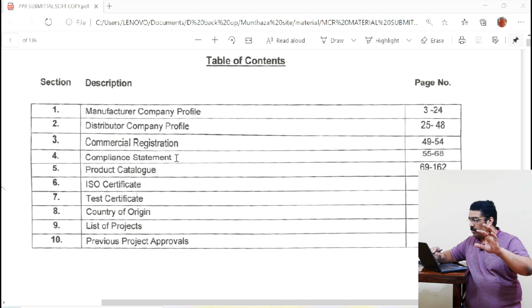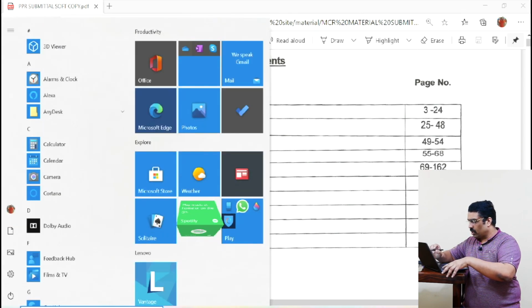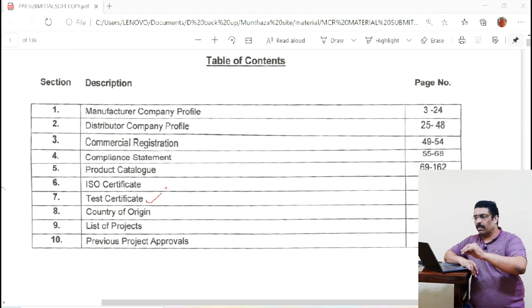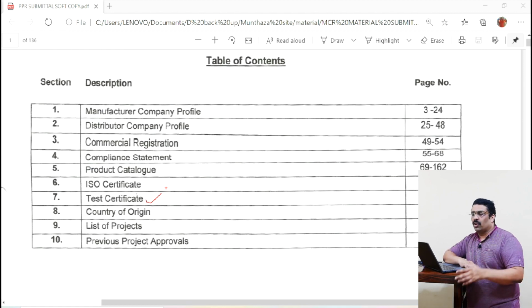Then the company's ISO certification, something like that, if you have it or not. See, if there is some certification, it is mentioned. And there will be some third-party certification. For example, the factory will give samples to laboratories or testing labs to make the tests. They will do the pressure testing or maybe the bending testing or something like that. There are some criteria of testing, there is some spec as per the norms. So they will give the third party